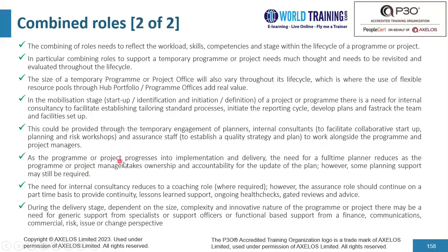As a program or project progresses into the implementation and delivery phase, the need for a full-time planner reduces as program and project managers take ownership and accountability for the update of the plan. However, some planning support may still be needed. The need for internal consultancy reduces to a coaching role where required. However, the assurance role should continue on a part-time basis to provide continuity, lessons learned support, ongoing health checks, gated